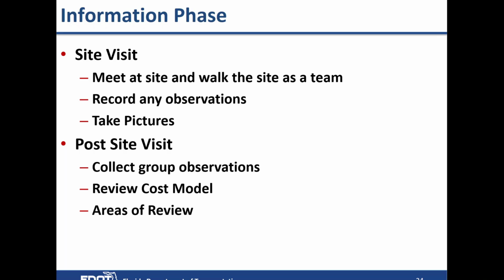Then after the site visit, they come back and do a post-site synopsis. The group shares any observations they had individually. The team will review what the cost model is, and then they'll come up with some broad areas of review of what they think they should focus on.